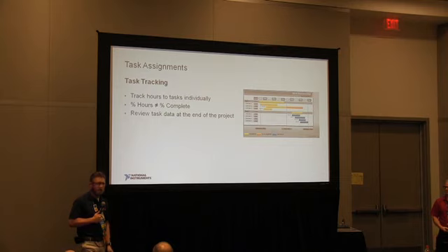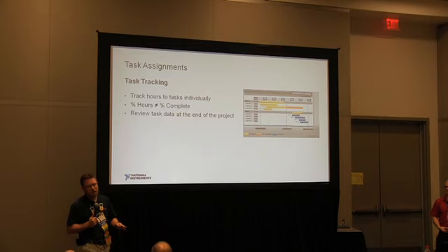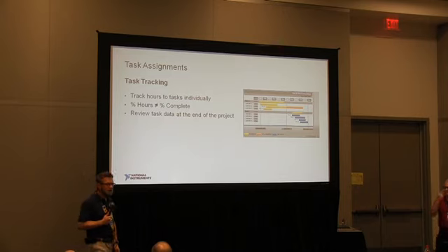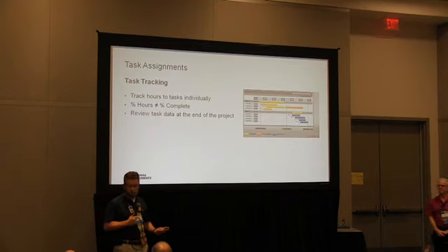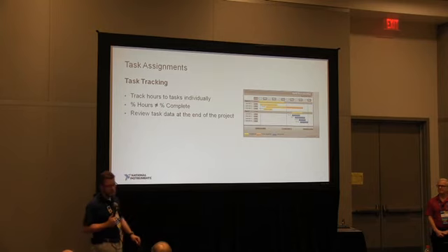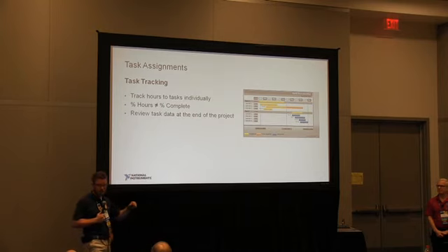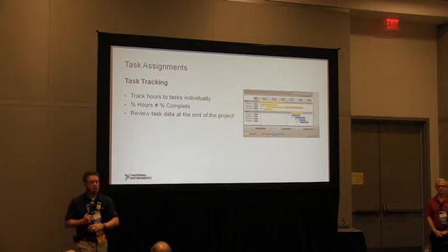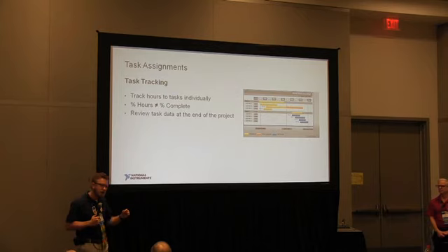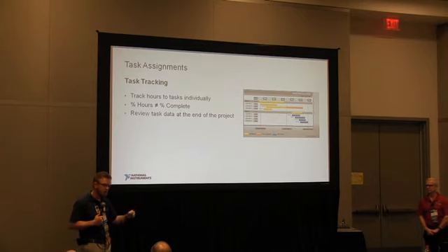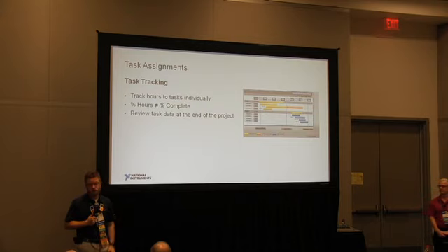Again, I'm answering questions with vagaries. I apologize for that. But so much of this stuff depends. I would say you at least need to have statuses at a minimum once a week, depending on the magnitude of the task. If it's kind of a turn-the-crank task where we just need somebody to punch out code that does this, maybe it's not as often. But if you're having to develop new ways of doing things, things that have never been done before, maybe it's once a day. Maybe it's, hey, call me when you get stuck.